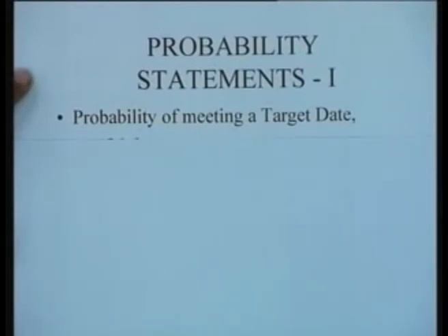This is the kind of information that a project manager would be very keen to find out. Now let us say that the target date for our example is 36 days, right? So it's like trying to say if you're working 6 days a week after 6 working weeks. So what is the probability that the project will be completed within 36 days? This is the point that I want to find out.